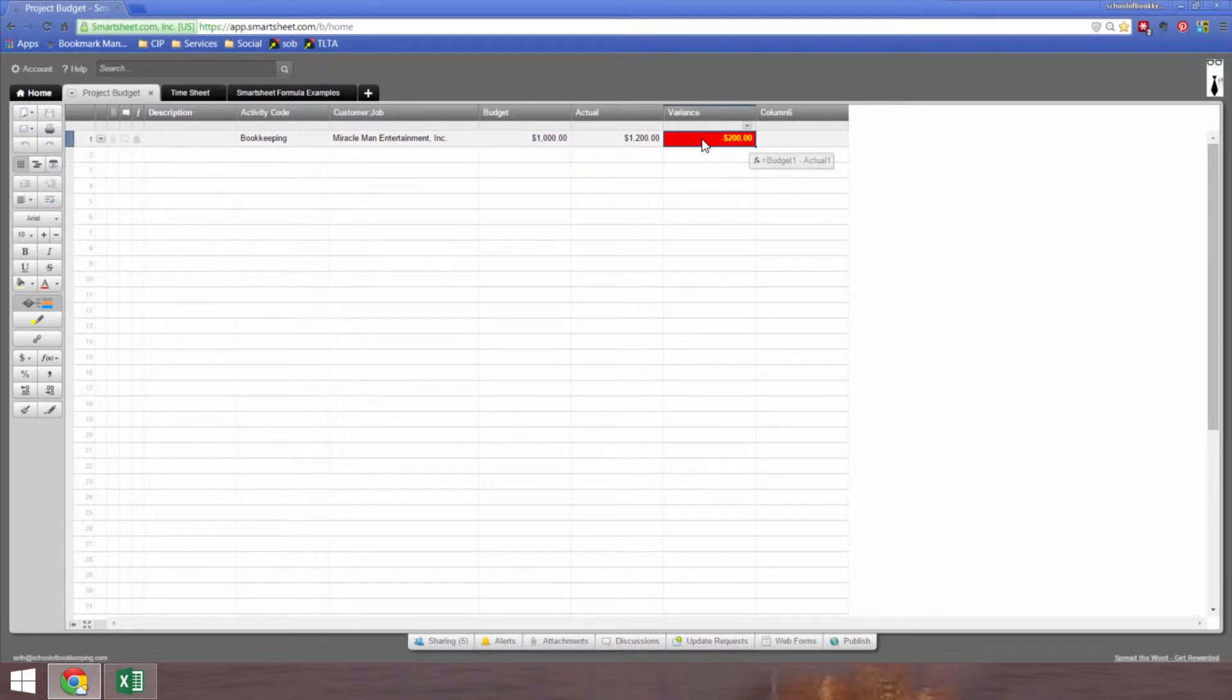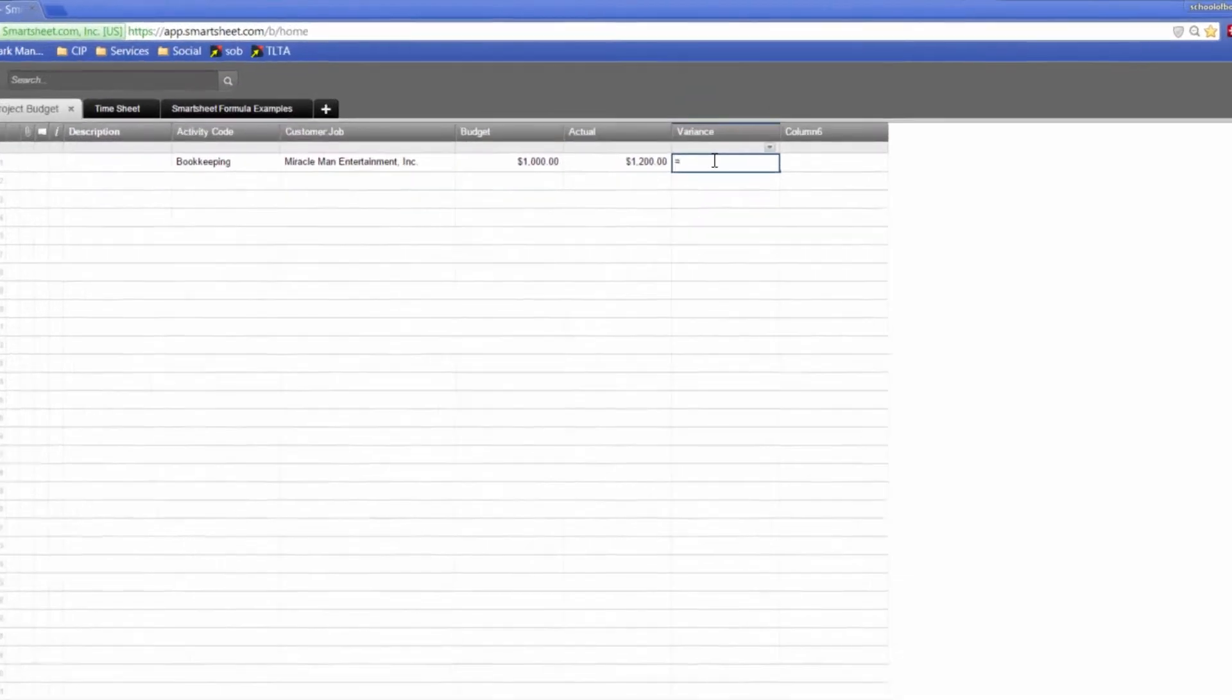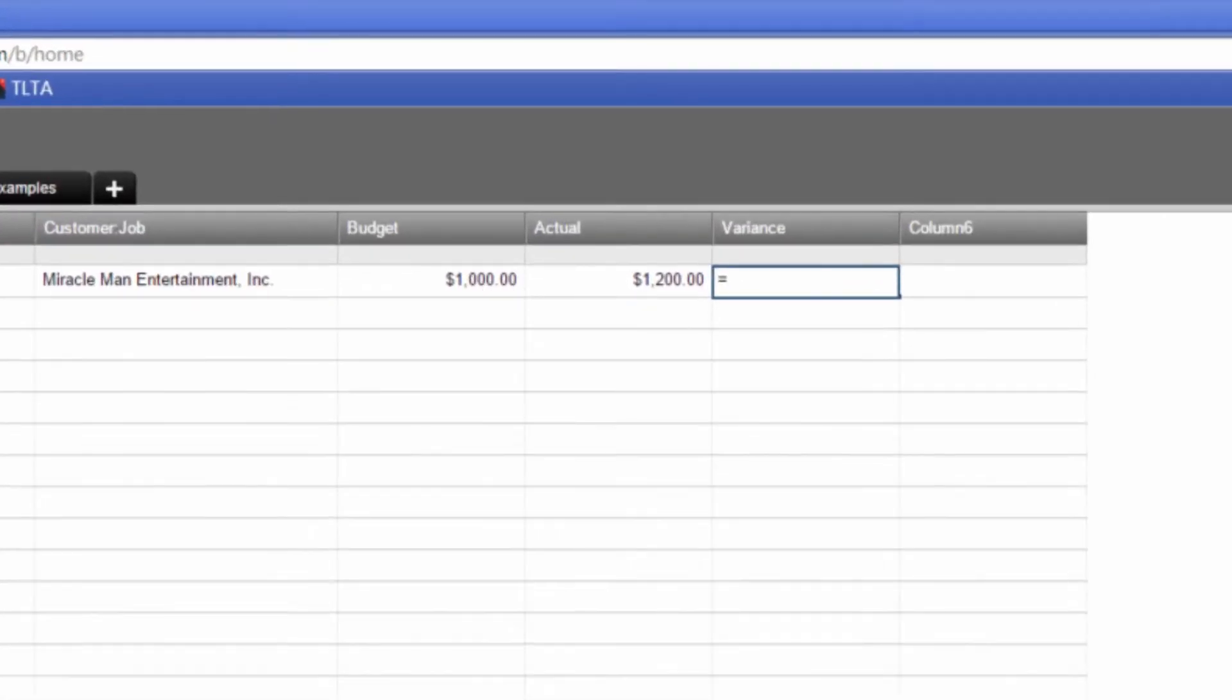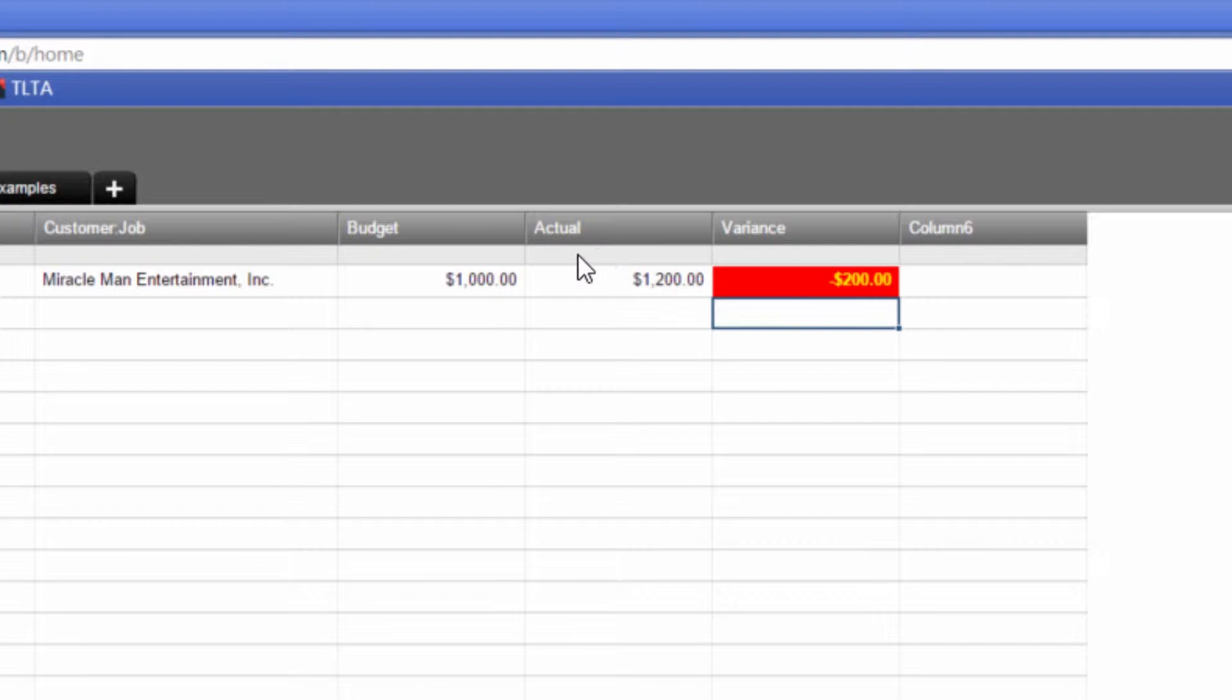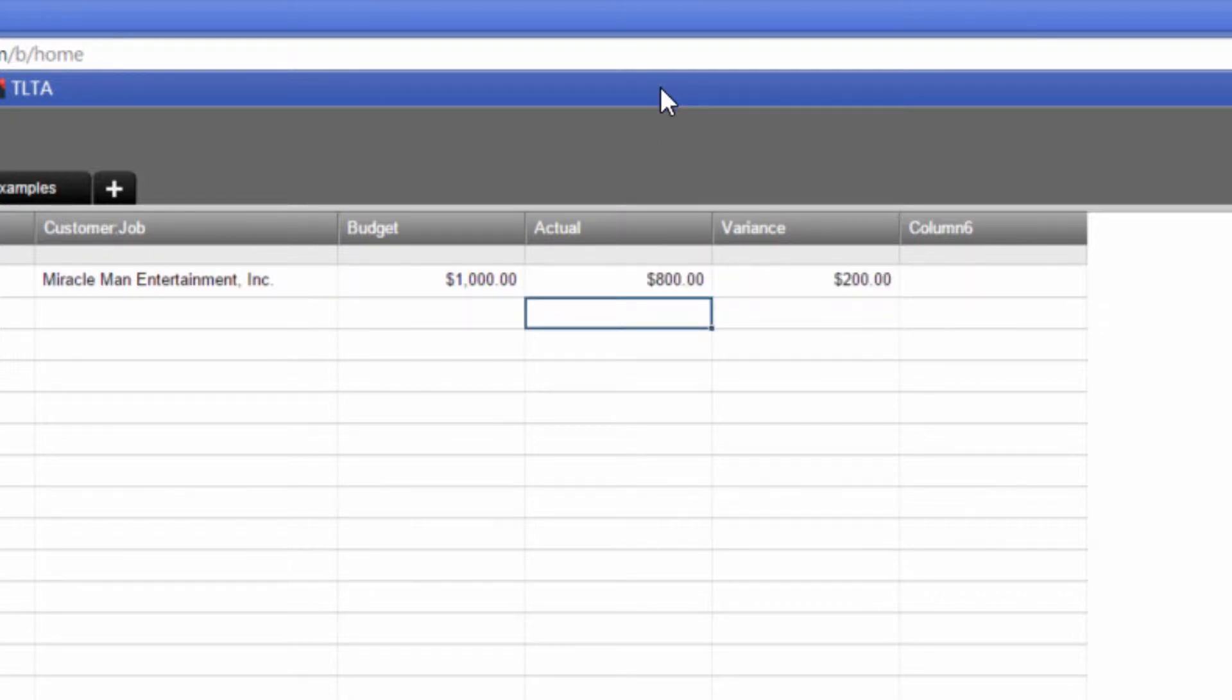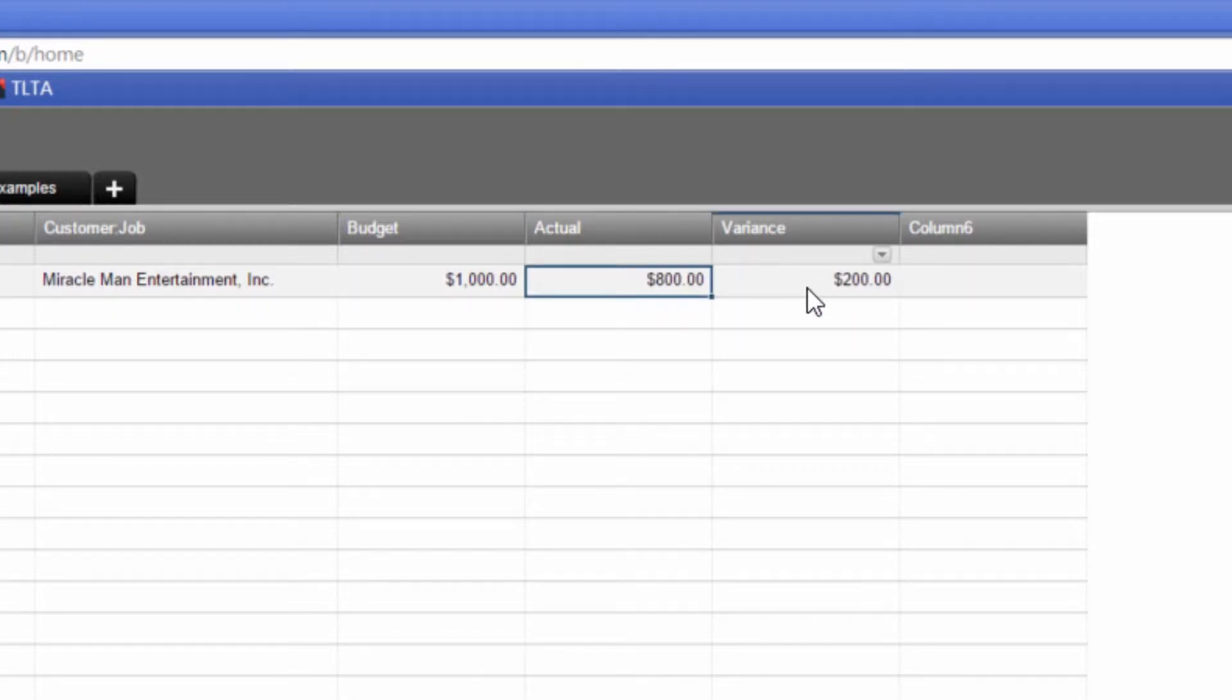The formula for this is very easy. If you've ever written a formula in Excel, you know how to do it. Equals the budget minus the actual. Enter. And now if the actual was less than budget, of course, the conditional formatting goes away.